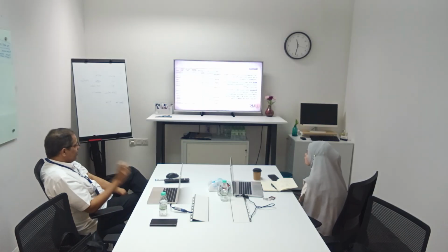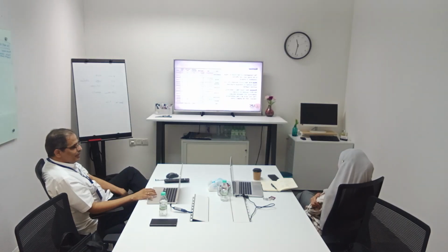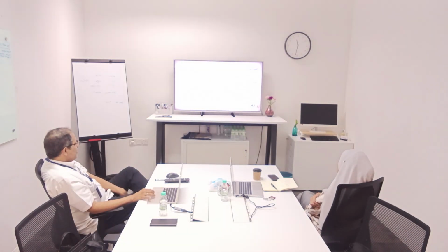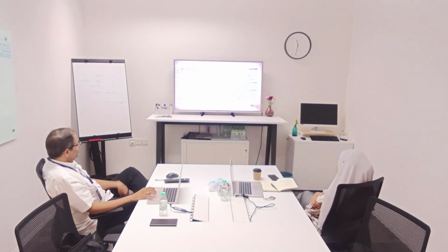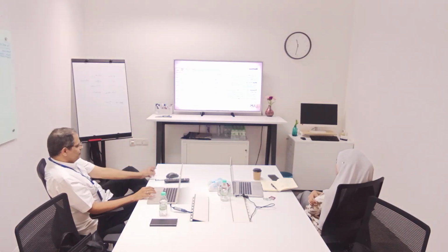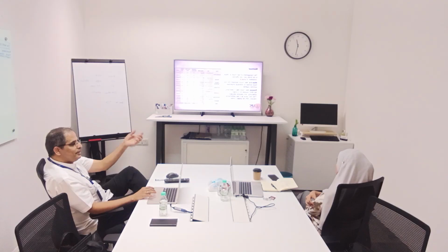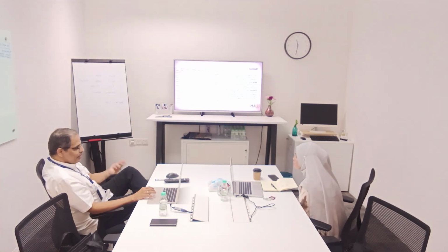And also we have resources here, because we want to allocate resources based on how many hours they spend. They also serve as the key performance indicator for the project controller. So if, for example, I allocate the resources for 5 hours, you compare the performance with the target. Okay, we run out of budget because we worked more hours. Why did you work more hours? Is your estimate wrong? No, our estimate is not wrong, but the workers don't work within these hours. So this one can tell you.